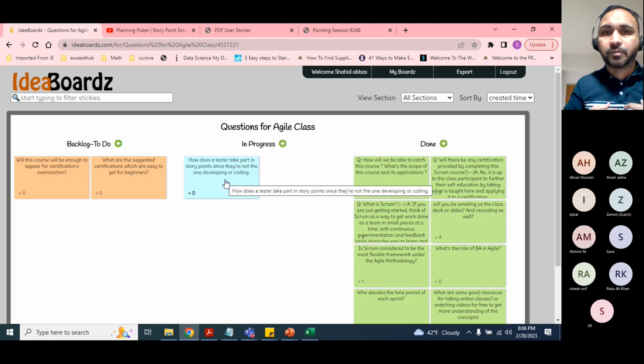For example, I'm a developer and I size the story point only 2, but you are a tester and you size it 5. There's a difference, right? As a Scrum Master, I will bring both to the table. Let's talk about it: why is it 5? Why is it 2? And then they will discuss. Development is easy because it's a few hours. Testing is where the tester comes into the picture in sizing, and they talk about it. Okay, I looked at it. It's simple, definitely, but it has impact on other components that I have to test. So then they have to bump the numbers. Okay, got it, sir. Thank you so much.